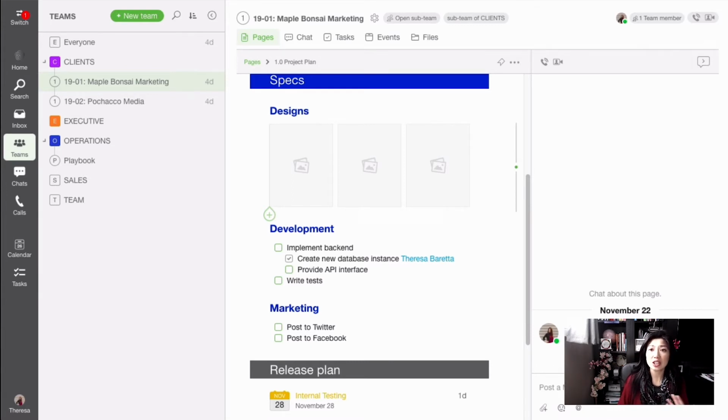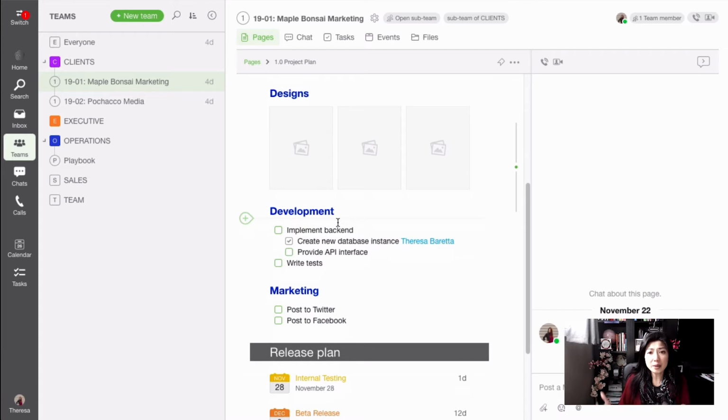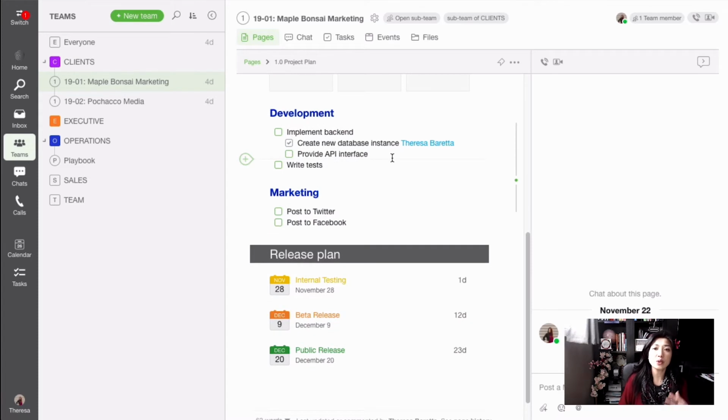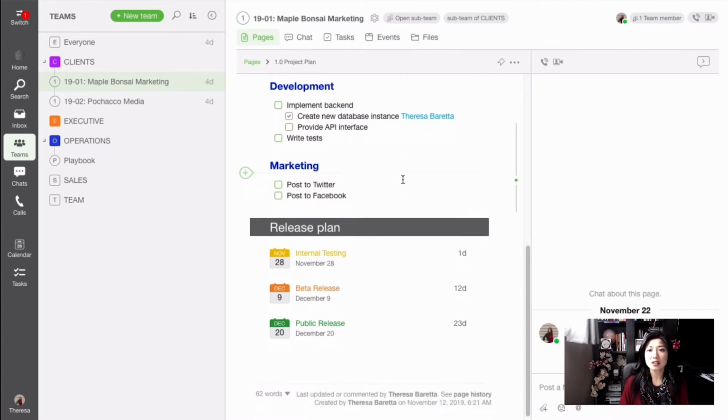Onboarding is complete usually when you've helped the client reach the first value, whether it's a milestone or something they can find value in. So in the project plan, I will usually outline what the team is responsible for creating, what will be some of my own focus areas, and because my own specific focus is in the area of business systems and operations, I outline a standard list of systems that we may require access to. And lastly, I always include a section for files and important links.